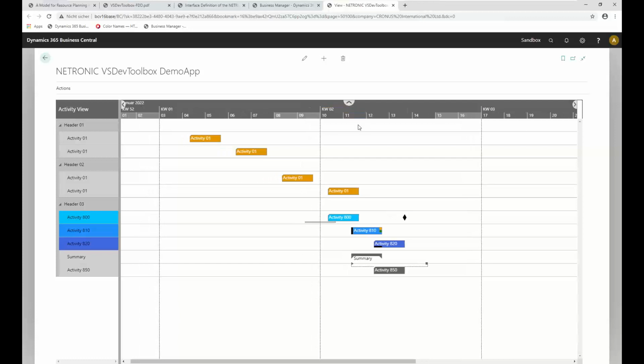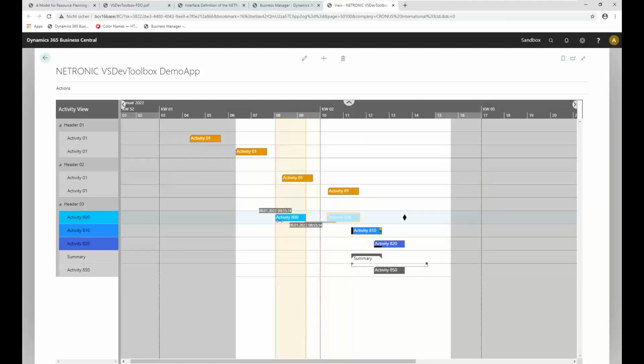This is something which supports the interactions. If you have a certain activity which is only allowed to happen in this time frame, you can set these values as well and support the user when rescheduling activities, so that it should only be placed inside of this time frame.